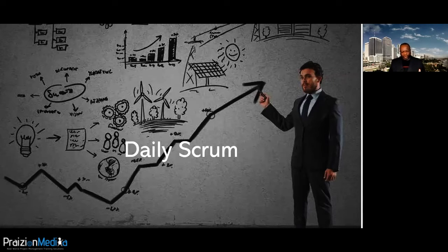When you hear daily Scrum, you're thinking of a daily stand-up. The team meets daily for short meetings, which are typically held standing up, face-to-face, to encourage brief sessions. This is not a status meeting, and we definitely don't want to get into that anti-pattern of it becoming a status meeting. So we only invite those team members. The Scrum team, that's who you want in attendance. Don't invite management except you absolutely have to, except they're curious.